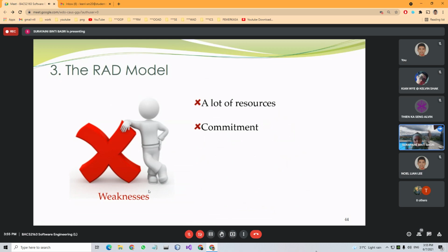Each of the persons involved in the development should have high commitment, because at the end, after each of the teams finish their module, there will be one specific time to do the integration. Okay, so if among the 3 teams, one team is delayed, still not finished with their module, the other teams need to wait for that left-behind team to finish their module.